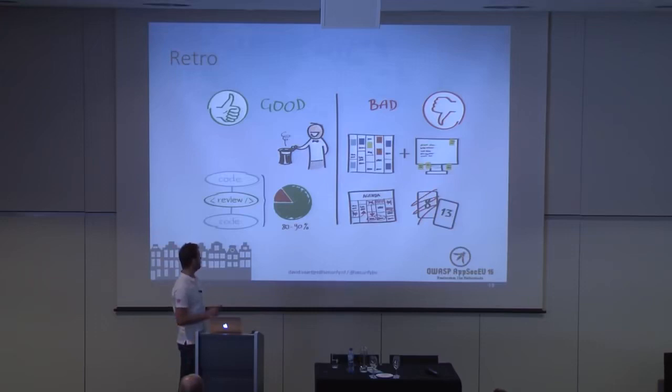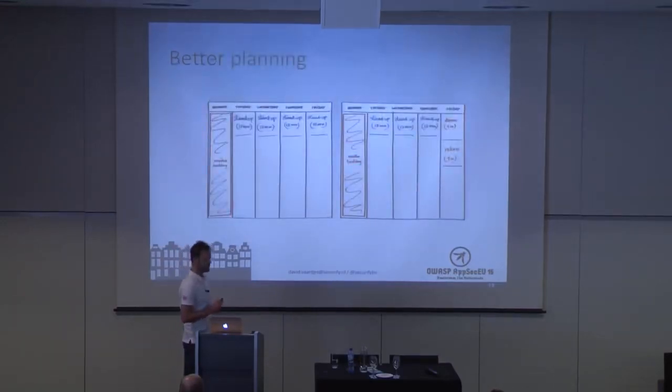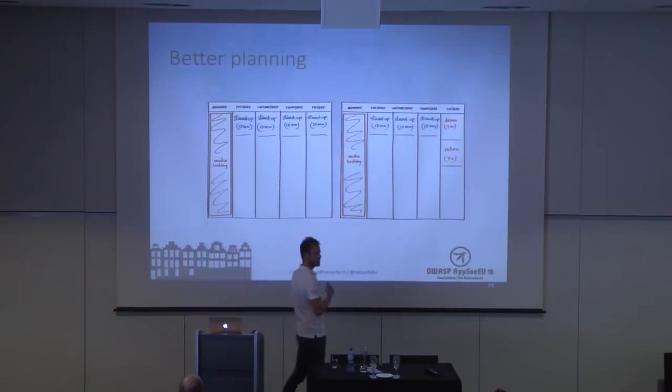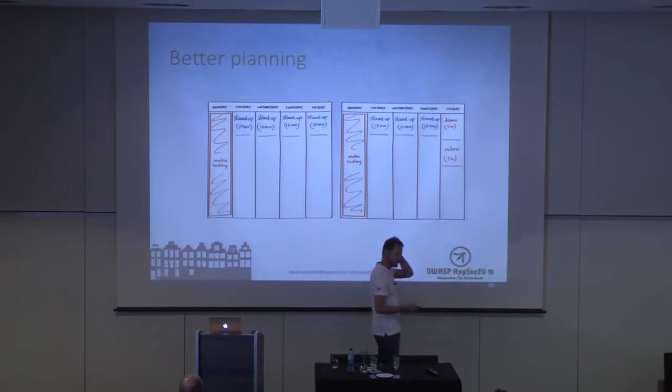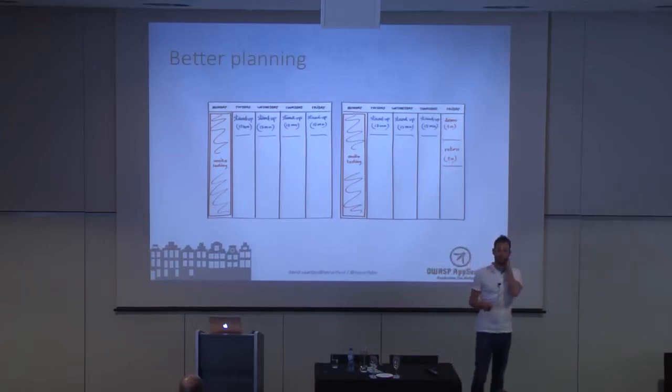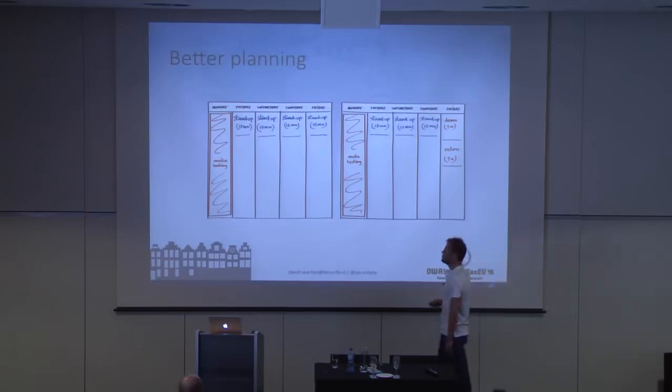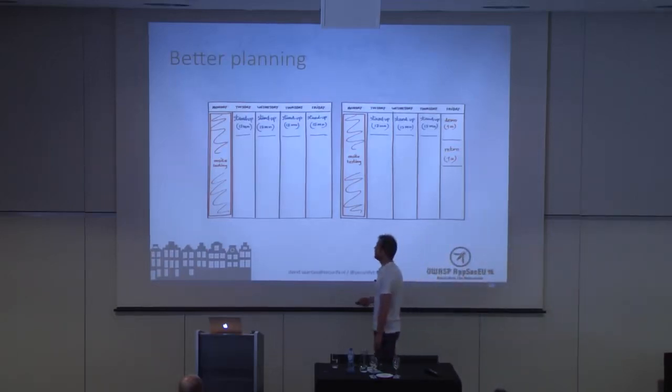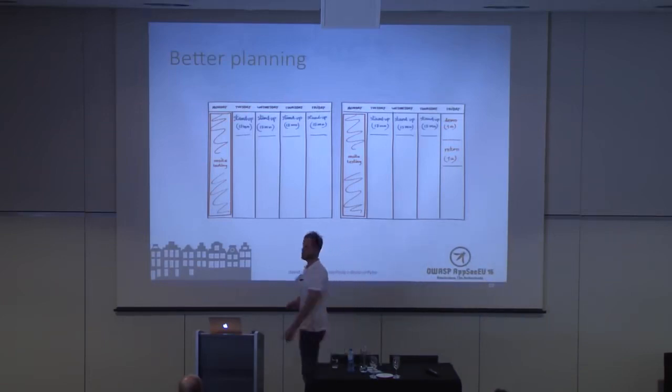So to solve this planning issue, we decided to just get on site for one day. Generally the day of the grooming, so we could join the grooming session, and the rest of the day we just sat together with the team, reviewing the user stories, chatting about security, sharing some knowledge here and there. And this was way more efficient because we just collected all the stories that were checked in the week before, and we did a review on it on Monday. If we got some feedback, we were sitting together so we could fix things really fast.